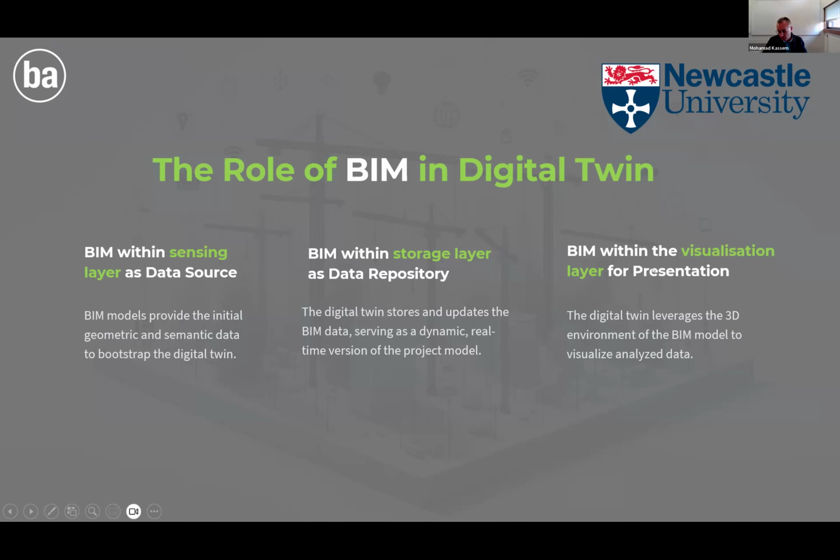In this case, it's not the technologies, it's the data collected. So what data are used and collected across each CDT application? If I go back to safety and risk management, you can see the most used collected data is equipment on-site location, on-site laborer location, and so on. So you have a really good mapping between application and data, application and sensing technology, and we do that for everything else.